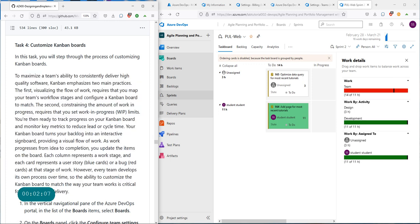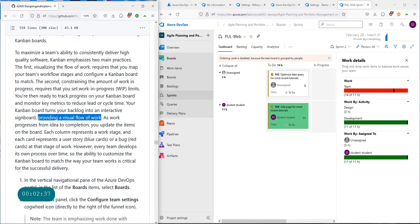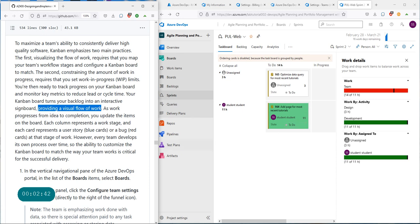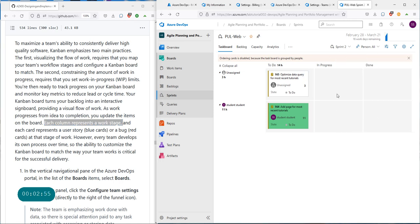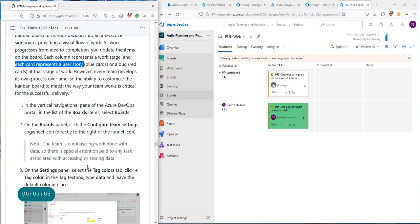The other thing you want to know is the amount of work in progress — you can set work in progress limits. A lot of teams without a digital Kanban board use sticky notes with different colors, moving tasks from one stage to another on a big board. Each column in a Kanban board represents a work stage: to do, in progress, done. Each card represents a user story, bug, or other work item.